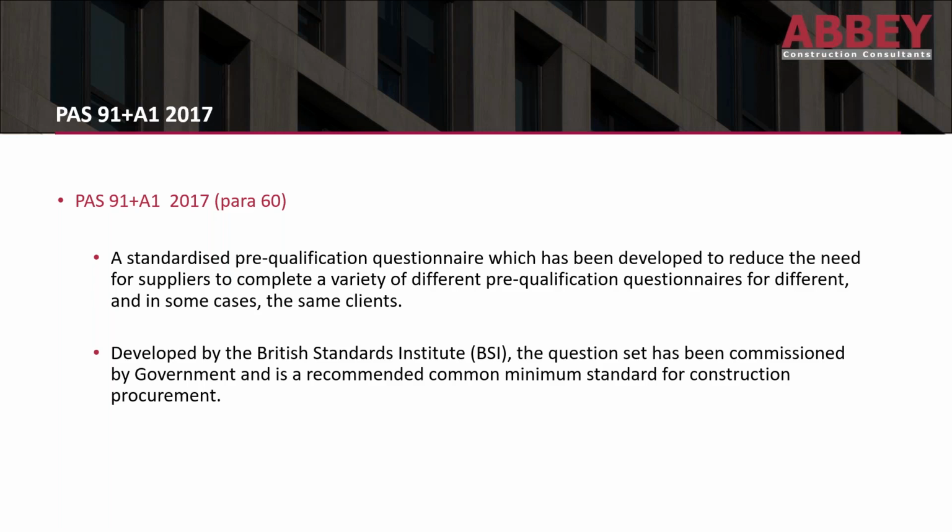So for me, I would have to do one set of pre-qualification questionnaire for one client, and then a different one for another client, and a different one for another client. Whereas if we'd all abided by PAS 91, I could have just done the one. The same information would have gone to each client, so it saves time and multiple completion of pre-qualification questionnaires.